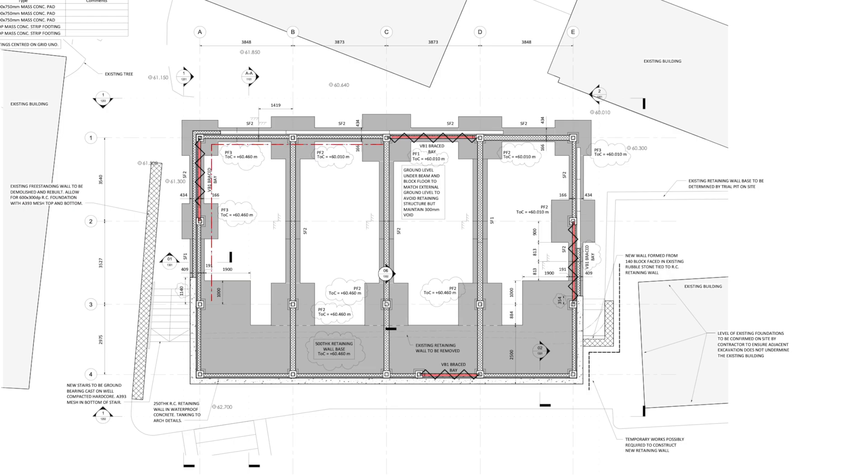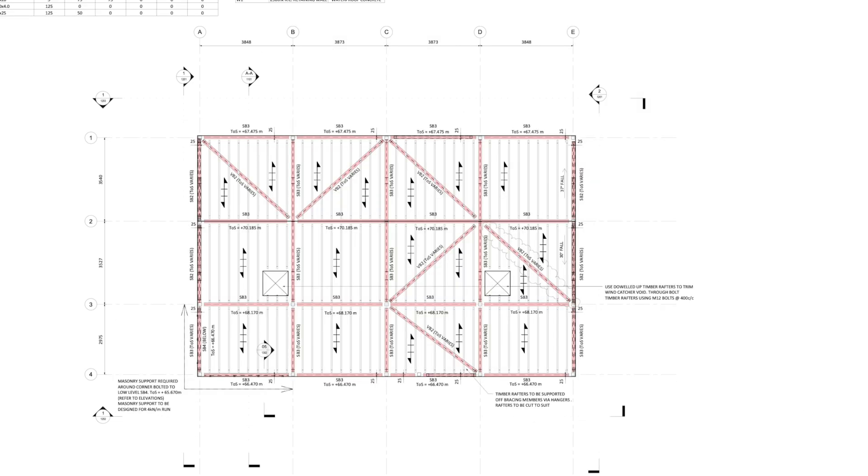Moving on to stage 3, which I'd call the first stage tender. For this stage I'd be expecting to produce a full set of drawings — proper drawings and maybe even a 3D model. I'd also expect that a lot of the structural solutions have already been ironed out and confirmed, and are very unlikely to change. A lot of the calculations should have been done already, and you'd probably be sharing models with the architect and mechanical and electrical engineers to coordinate your designs.